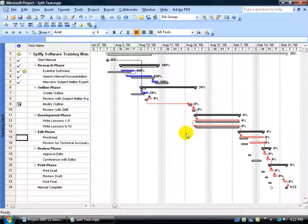And you'll notice that when I went to a different view, it cleared the filter. It went from Slipping Tasks to All Tasks. So if you switch tables, you're fine. If you switch views, then it will clear the filter for you.